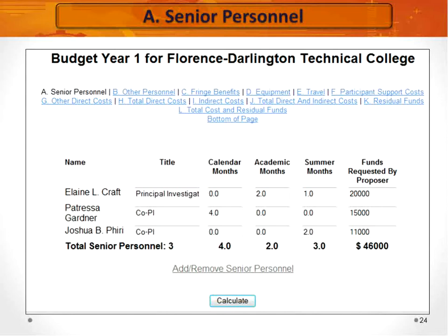This is likely to differ by college. You will want to calculate the percentages and work month equivalents based on your college's faculty loading practices. Then you want to prorate the budget request accordingly. You need the person's salary per month and how many academic months equate to this amount of release time. For the summertime, you just need to know what the monthly salary rate will be that you should apply. The time calculation gives us 1.8 academic months for the faculty member's time in the fall and spring semesters. To this, you will add 2 months' salary for summer work.